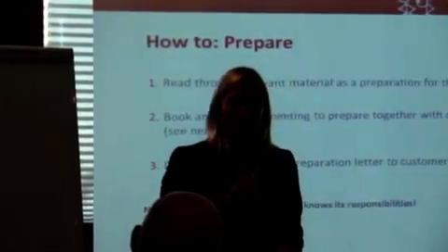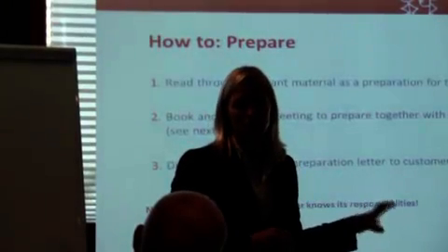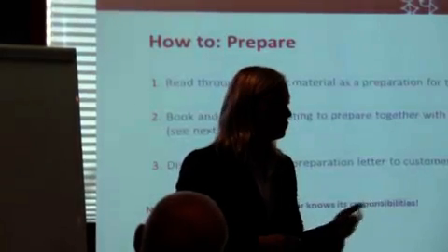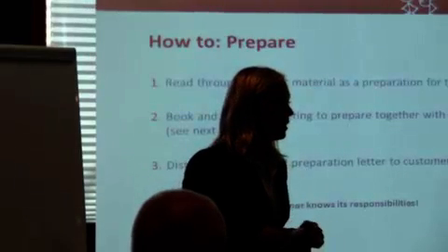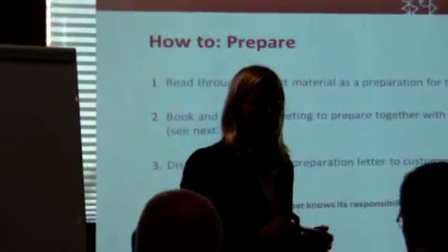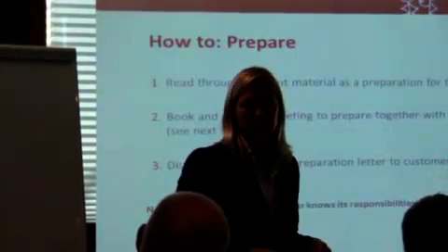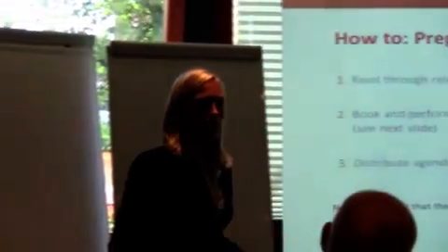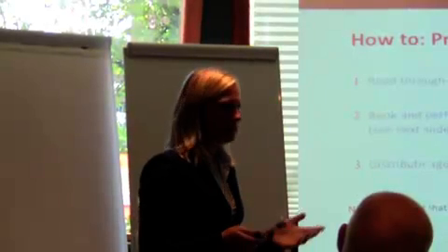And if you have people not present in the room that could have any objections to the things decided there, you could ruin everything, or they could ruin everything when this should be implemented. So it's very, very important to have all the people with the right mandate in the room. So the decisions that you made are not discussed afterwards by someone else.